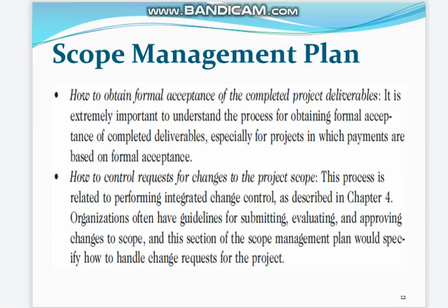How to control requests for changes to the project scope. This process is related to performing integrated change control as described in Chapter 4. Organizations often have guidelines for submitting, evaluating, and approving changes to scope, and this section of the scope management plan would specify how to handle change requests for the project.